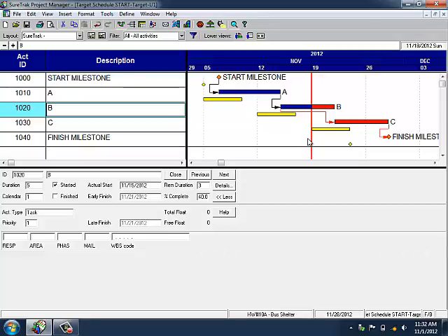How are you doing? How are we, guess, the baseline, and are you ahead or behind? So this is real-world scheduling methods that makes anything for the client, hey, you're ahead or you're behind. We'll just look at the printout. Don't look at the dates. Look at the bars. Compare the actual progress to the yellow target.